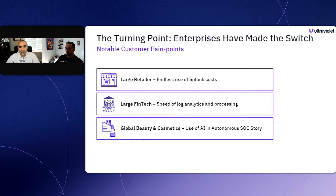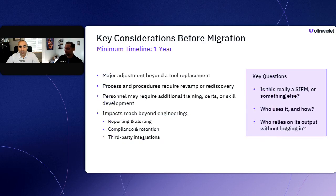All right, moving along, before we get into specifics around how the project works, what the key stages of the projects are, and the lessons learned within each stage, what's the timeline? You see written in front of you, 1 year. For large deployments, you may think it's 3 to 6 months, which oftentimes it is. But after that 3 to 6 month window, all the value that's created leads to, I want this log source too, and I need this dashboard too. That implementation, that migration continues much longer. The success of the project leads to even more depth and length in how we continue to derive value.